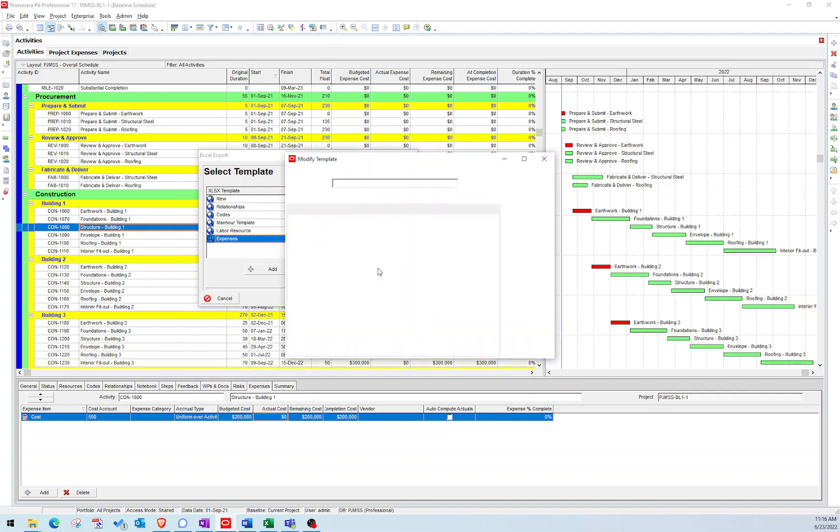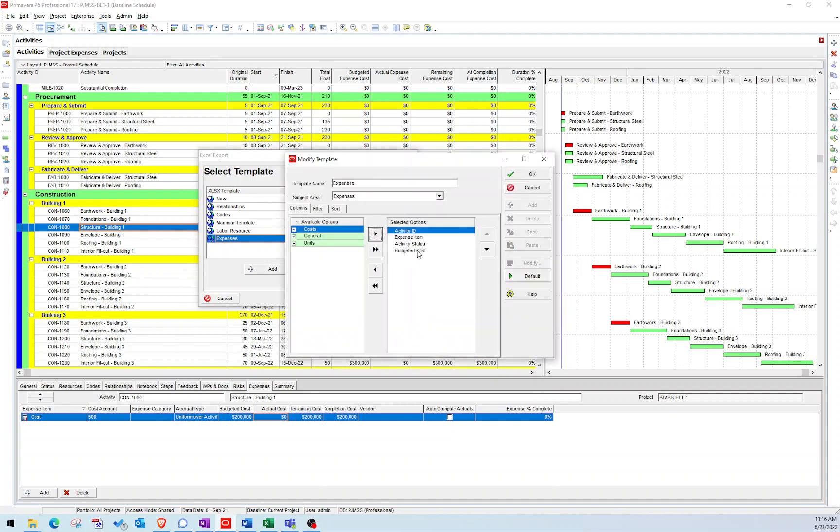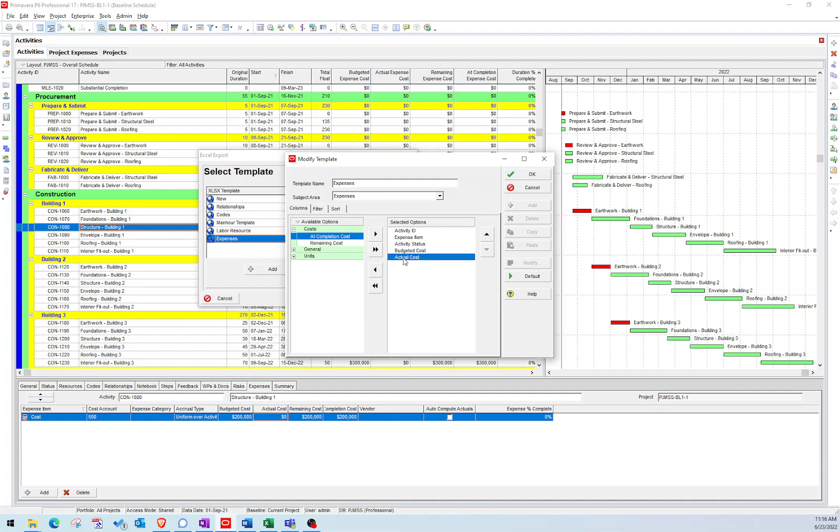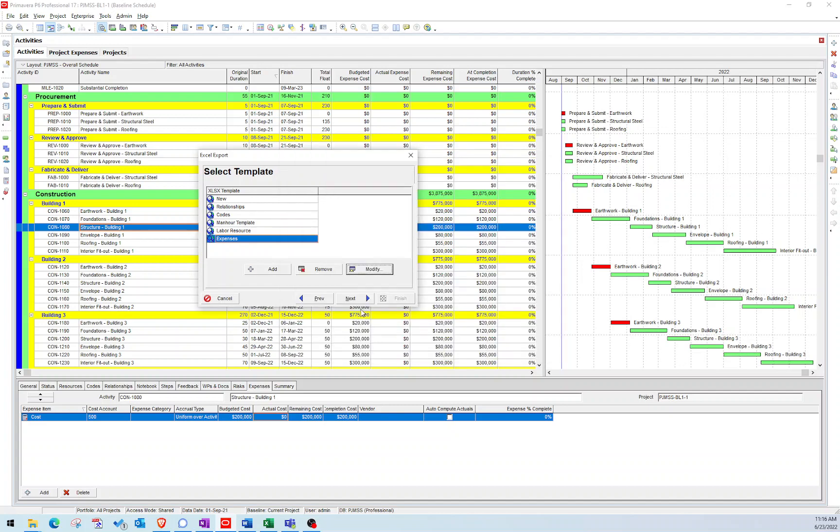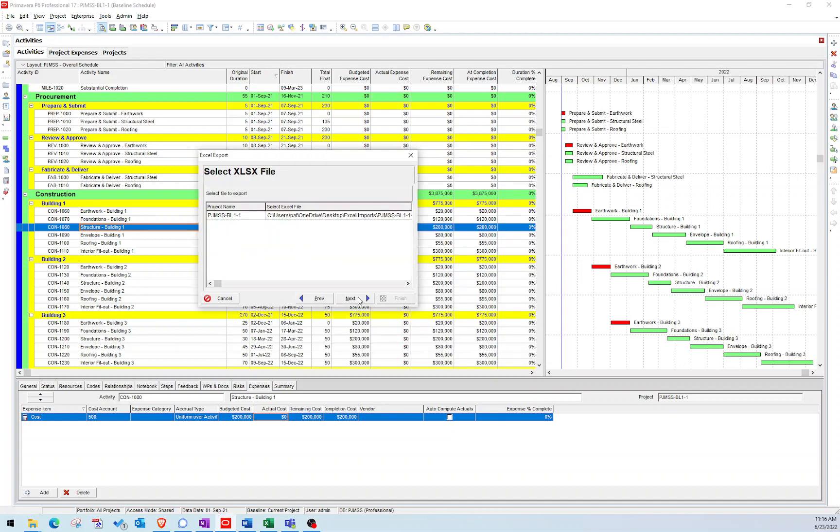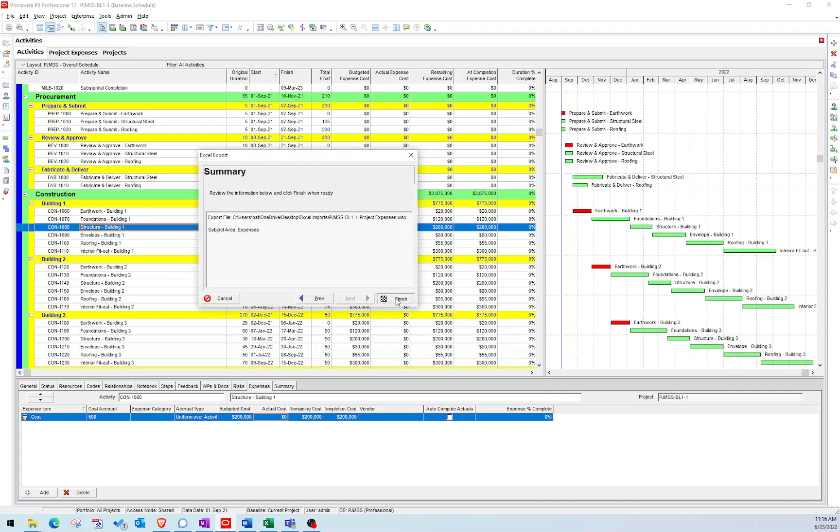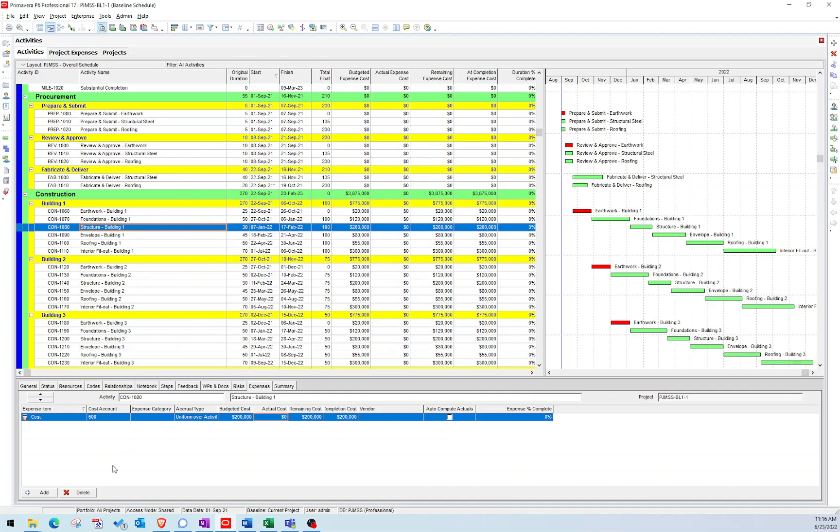Let me go back there. We don't need budgeted costs. We need actual costs. So let's get rid of the budgeted costs because the actual is what we're wanting to pull in. So let's press OK, next, find a place to export the file to, next, and then finish. And so now our file has been exported.